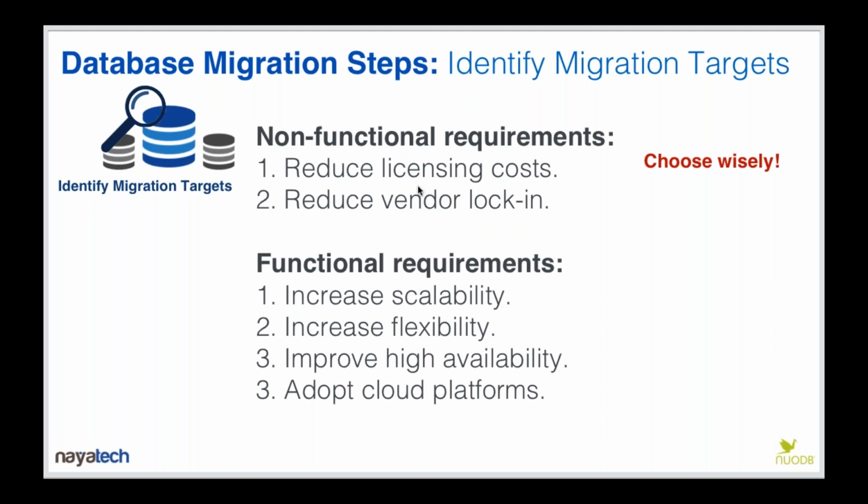So I would recommend spending some time in this first step to identify which databases you want to migrate. If you're coming from a business perspective, you can pick and choose the databases you want to migrate based on their migration complexity. Or coming from a functional requirement, you have a specific system or systems that you want to migrate, and then you have to deal with how complex or not complex these systems are. So this is the first step: identify your database migration targets.